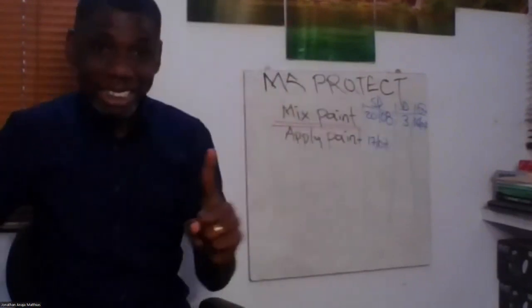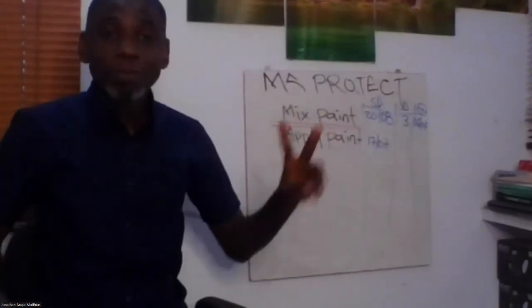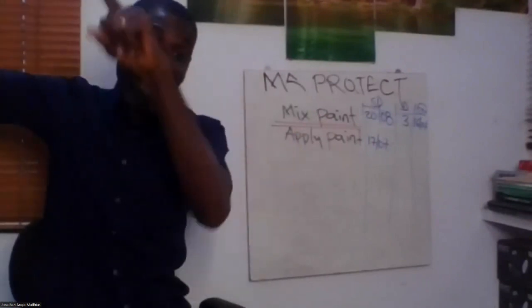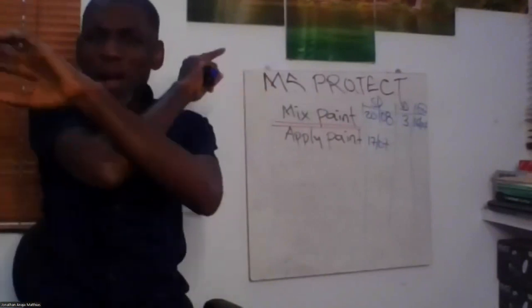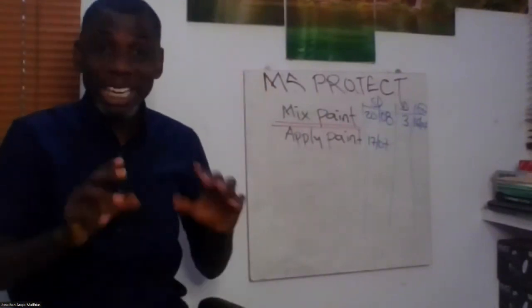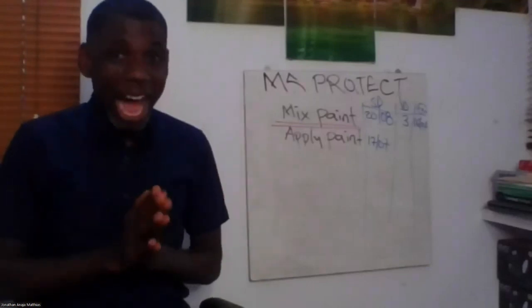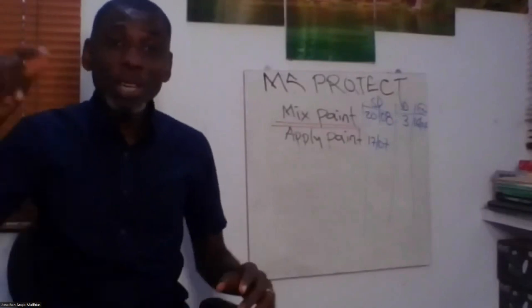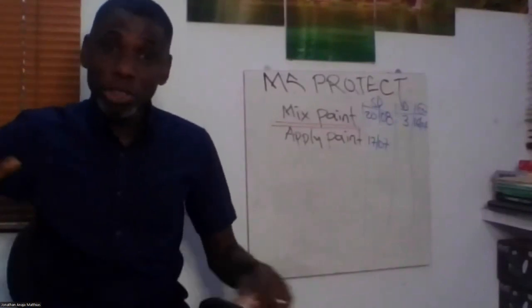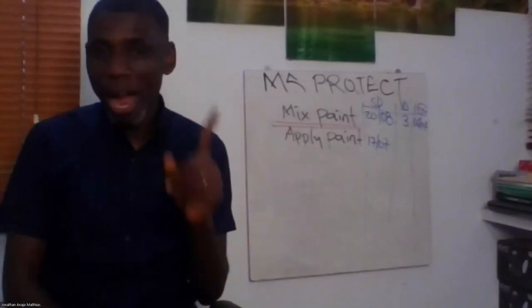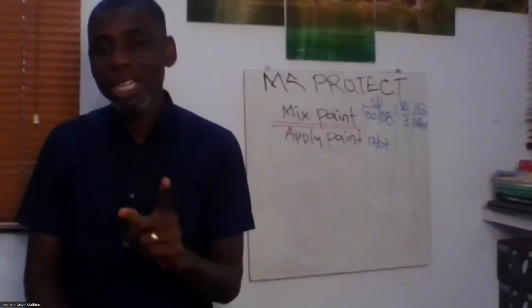Both their start dates, their end dates, their cost, it will go to my report and adjust my cash flow, and it just makes my work easy. So when I finish doing the cash flow, even if it is a cash flow of 24 months and the spreadsheet is 100 pages, I will not need to go back to each of those 100 pages to change anything. Why? Because I linked my successor activities to my predecessor activities.